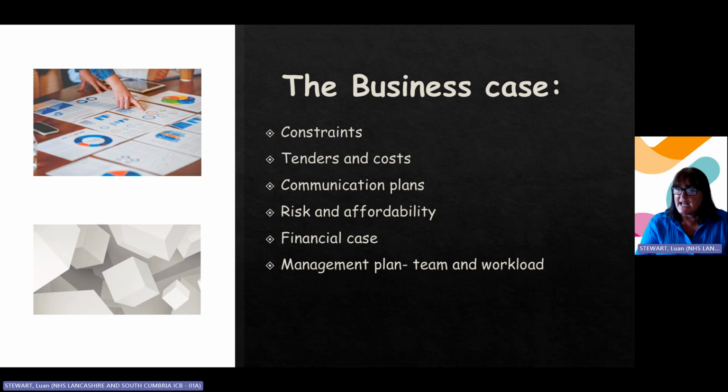But when this project comes to an end, or if you can delegate parts of the project, freeing up some of your time, there is a financial case to put together. It may be that you will have to hire someone to project manage for you because you simply don't have the time, and that needs to go into the financial case as part of the business case. So you may be taking on a project and taking charge of it, but you may actually end up having to hire someone to do the day-to-day work, and that would need to be considered in your financial case when you're going through.